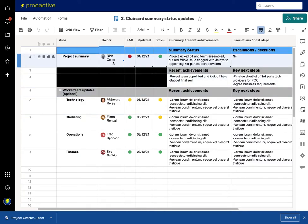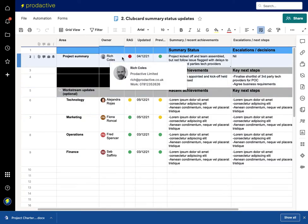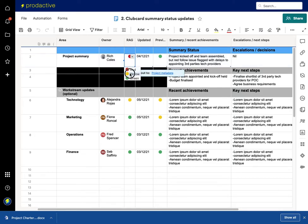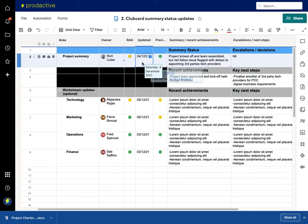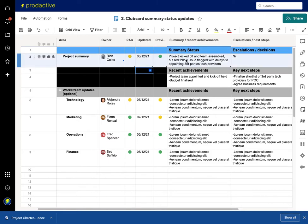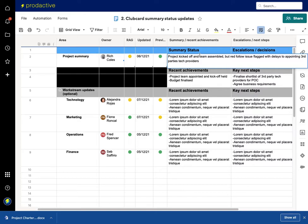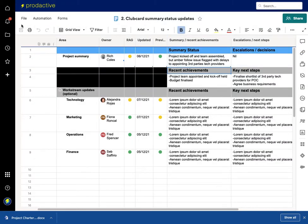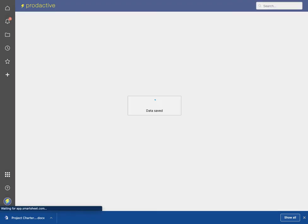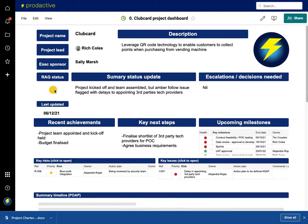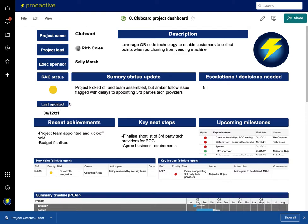Just to give you a sense how quick and easy it is to update, the way I have my project set up is I have that as a separate sheet. In the summary I'm going to change the RAG status to be yellow, I'm going to add in today's date so that's updated to be the sixth, and project kicked off and team assembled but I'm going to change that to be amber following an issue. If I now save this and come back out, you'll see how the status has updated on this main sheet here already.